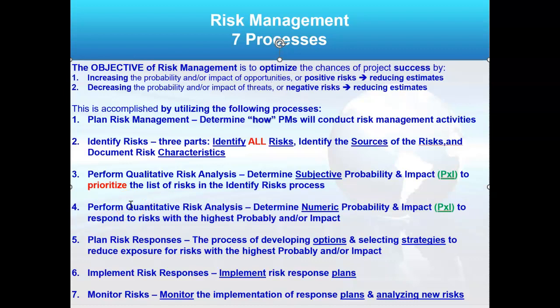They're big ones. And then, of course, you plan your risk responses, implement them if you need them, which means looking for triggers. You look for triggers so you can see the risk coming and get ahead of it. I mean, you did go ahead and plan it already. And that means constantly monitoring risks, maybe retiring risks that are no longer a problem. Maybe it's in January, but it warmed up to 80 degrees. The ice is no longer an issue.